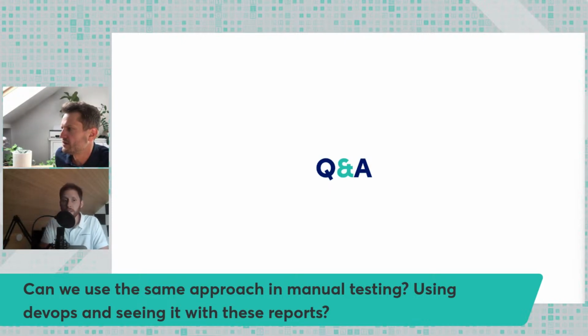Yeah, true. That's possible. The only thing is that there is something called configuration in DevOps, so you can send your test case results from automation with a label called automation, and the other ones can be sent through with a label manual. And then when you see results, you just highlight those two checkboxes, and it's all going to be merged into one progress report in DevOps.